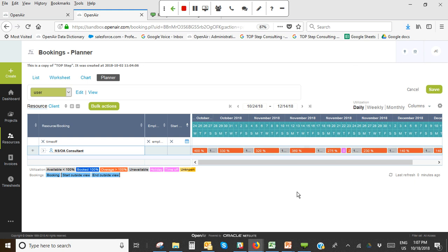So you can actually use the scheduling actions in OpenAir to schedule out an expectation of the types of resources that you need and schedule out the hours that they need to deliver. And those can be rolled up to understand your FTE simply by using what's called a generic in the system, if you don't happen to know the name of the person who will do the work.